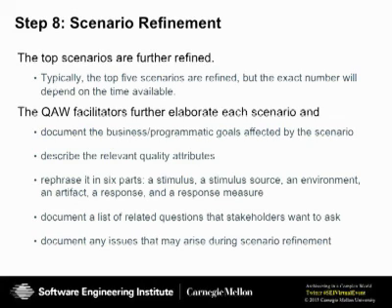By the time we have finished step 7, it is usually about 12 o'clock or 1 o'clock in the afternoon on the first day. So when we begin step 8, we have about 4 hours left during the first day to do scenario refinement. And it's very typical that in the 4 hours at the end of the first day, we will only be able to refine 4 or 5 scenarios. It usually takes stakeholders a little bit of time to get warmed up to the idea of, first of all, what is a scenario, and then what is scenario refinement all about.